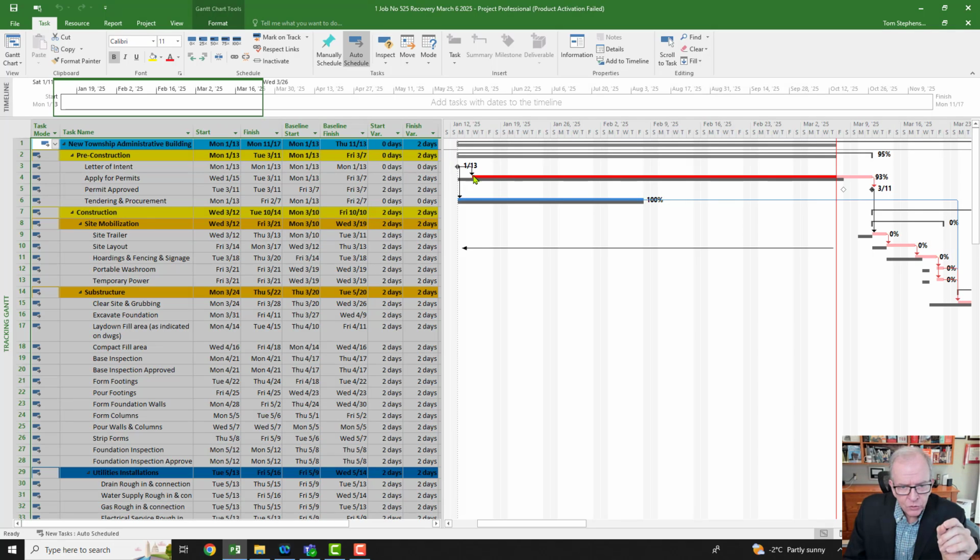And I'm not going to get into the reasons and how we put that in this one. I've done it in previous ones, and I'll probably do it in future ones. But in this particular case, I just want to do a series of updates. We'd figure out what got us to this position. We'd want to know and understand why we're 2 days behind, right? Maybe it was a design change at the last minute, something like that. And I'd put a note in that case. That would be the update done, all right?